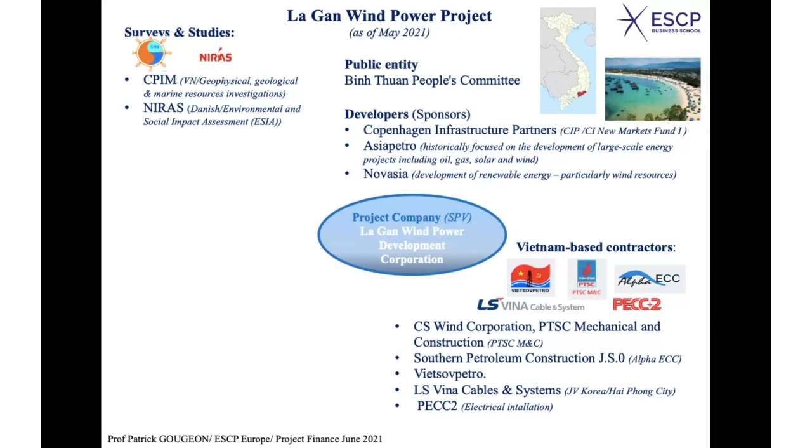NIRAS is a Danish environmental and social impact assessment specialist. Well, you need to assess the social and environmental impact of the project. Remember, I told you that not everyone is always quite happy with the scenery of these wind farms right in front of where they live. It may have a negative impact on tourism. All these things need at least to be taken into account and analyzed precisely to see what type of solution could be brought in to make sure that the negative impact will not be so strong. What else do you have?